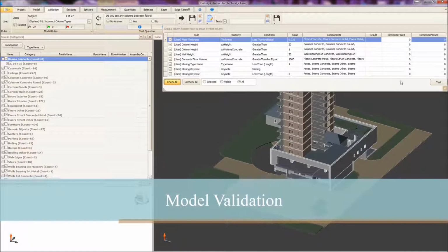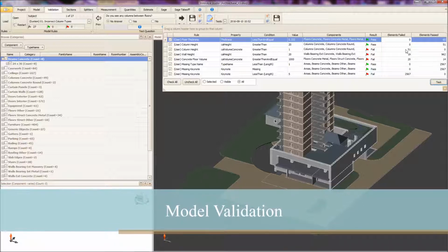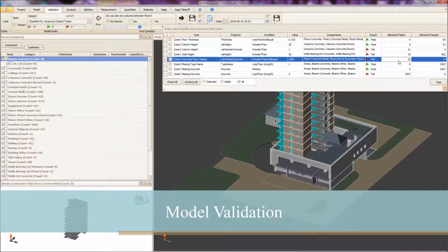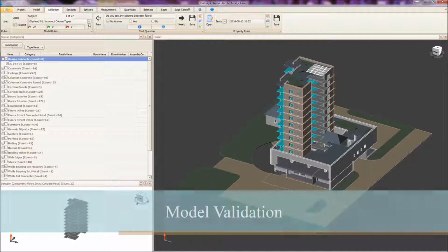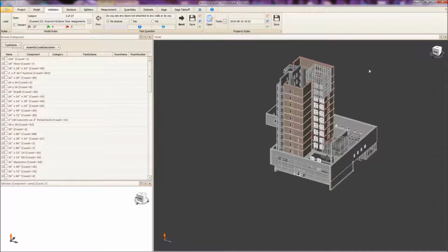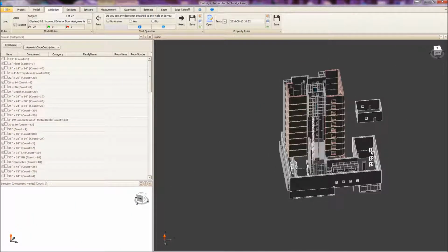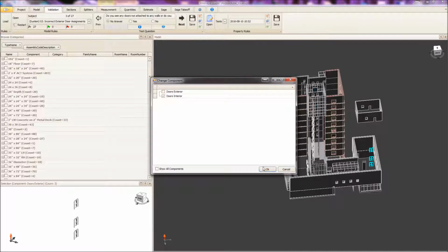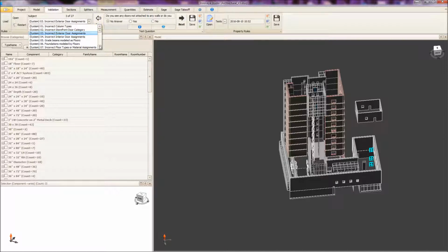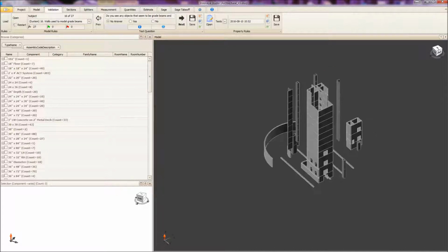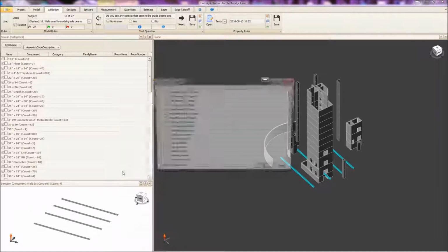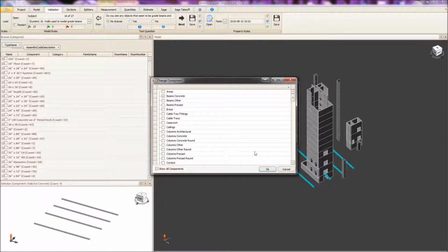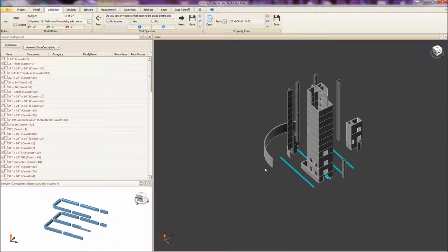Design models aren't accurate or complete enough for estimating, so one key feature of Innovaya Estimating is validation testing. With both built-in and user-defined validation rules, Innovaya can quickly validate models for potential issues such as incorrect element types, missing elements, or incorrect parametric data. For situations where the validation test reveals either incorrect or missing information, Innovaya can correct the models by changing component types or changing property values. And these are necessary features because Innovaya, like construction firms, understands that models will never be perfect.